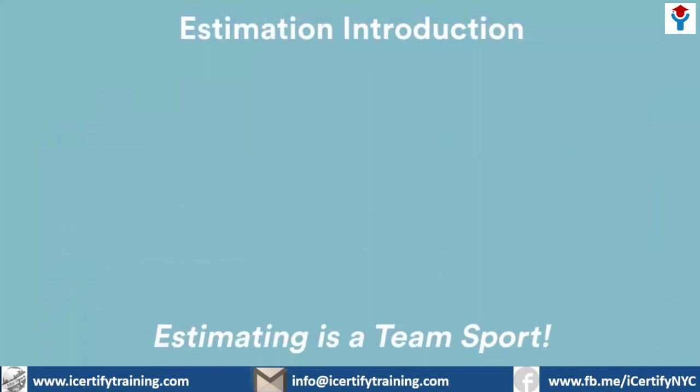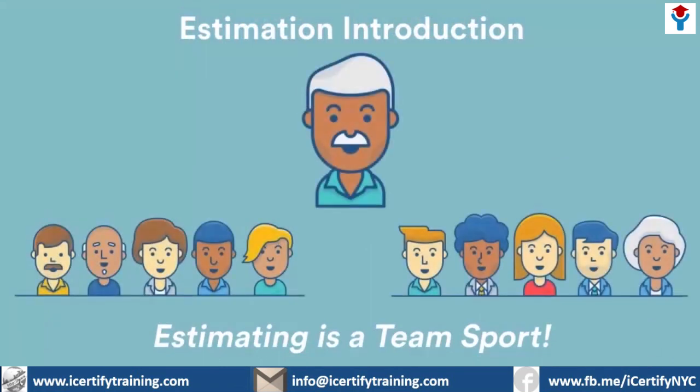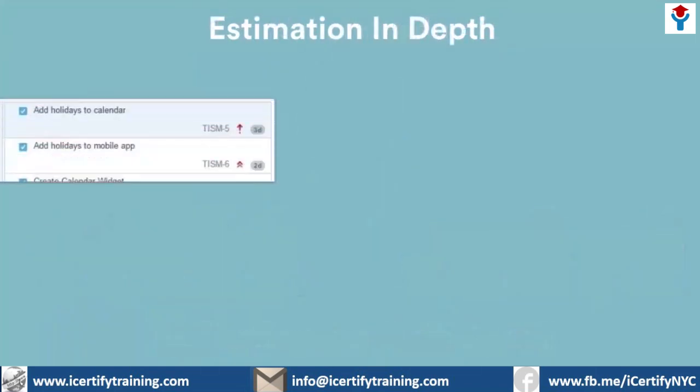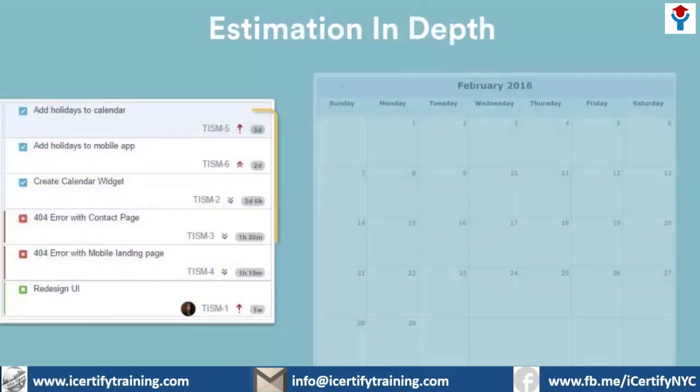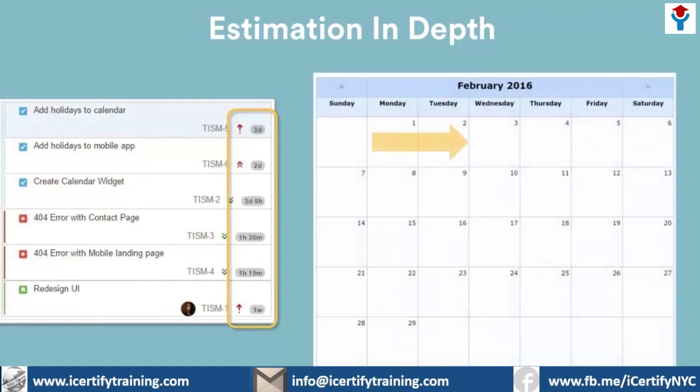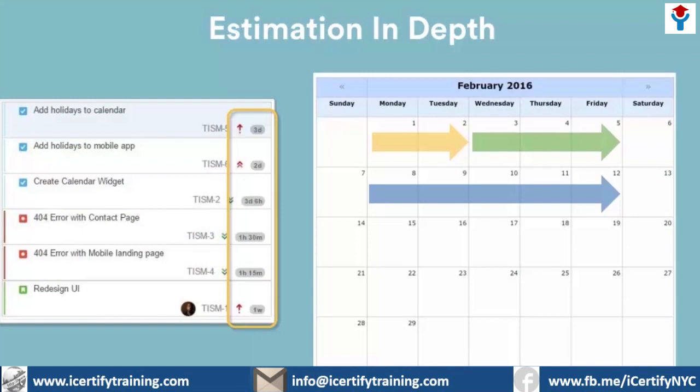Estimating issues is a team effort done by developers and Scrum Masters. Developers are crucial to the estimation process because they're the ones that have the best idea of how much effort a task might take to complete. There's several different estimation methods to choose from, and your team decides which is best. Some development teams give estimates in a time format to suggest how long a work item might take to complete. Say, for example, 4 hours or 2 days. This is called a time or hour estimation, and it's often where Agile teams start.